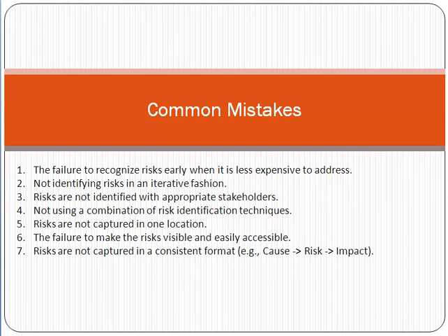Whatever risk you are identifying should be placed at some common place so that everyone can view the list you have identified, and if they have any feedback they can provide it accordingly. Risks are not captured in a consistent format. Consistent format means, friend, cause, risk, impact: what is the cause, what risk will happen, and what will be the impact on the project. So proper, consistent formatting is not used.